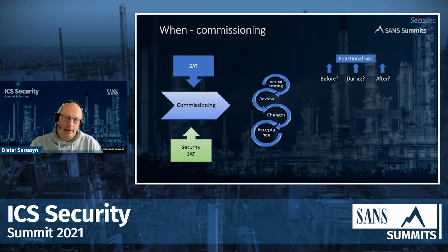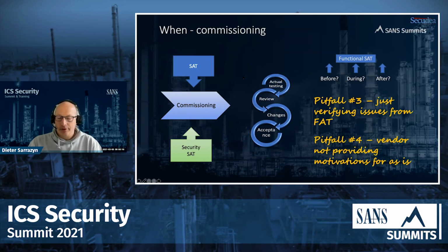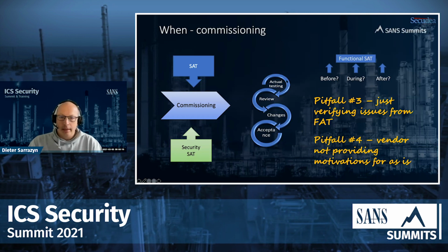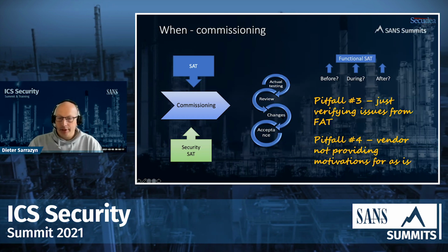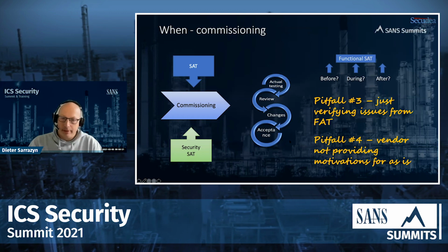The SAT is actually a little bit similar, with the difference that if you look at the actual process within the SAT testing, you have the actual testing, review, changes, and then the final phase added is acceptance.